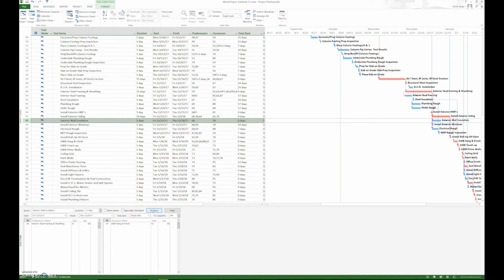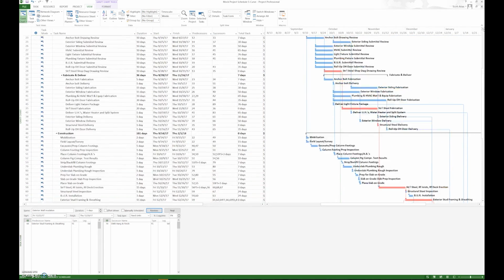So we're going to go through it from beginning, from early start to early finish, making sure that we resolve any excess float. Having a lot of float is not a bad thing, but as we've seen here, it can uncover a bigger problem that we may not be aware of. There may be a missing successor. It may be the inappropriate successor, like in this case, or it may just be okay. It may just need to be reviewed. So not a bad thing to do.